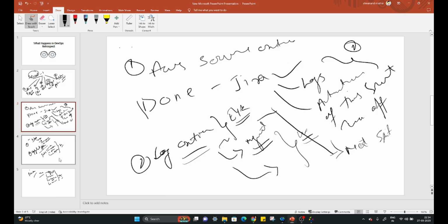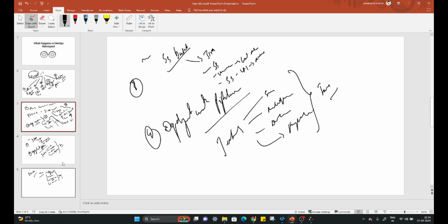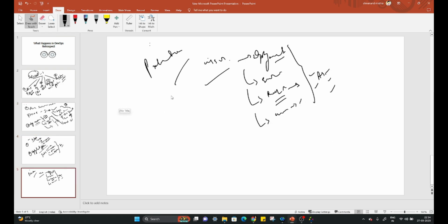The same way we discuss in the developer retrospects or the QA retrospects, we have our own setup of DevOps retrospect, where we discuss as per the sprint if it is going on. As task-wise, when we take the tickets or anything, and we estimate it and then we work on it, that's how the retrospect works. And whenever the retrospect points are mentioned, then in the next sprint plan you take these things and go forward with the next action plan. Okay, so that's how DevOps retrospect works. Thank you so much.